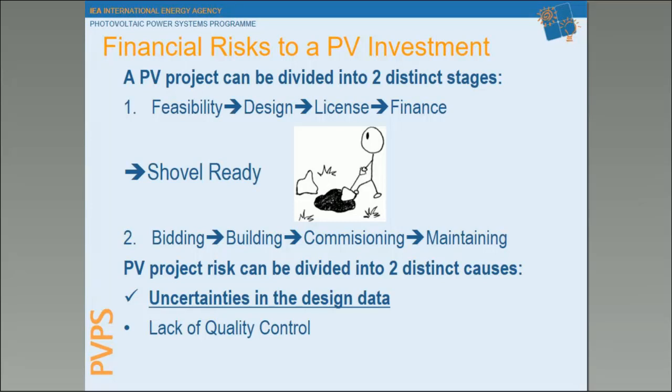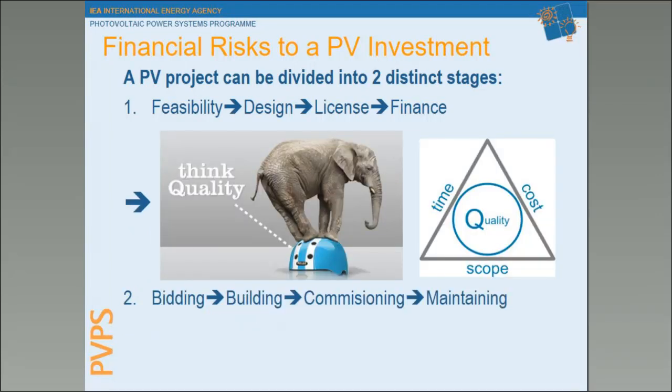If decisions are changed during the financing and bidding stages, then the owner must ensure that the necessary simulations are reworked. Achieving the financial goals of the project depends upon good quality control to ensure continuity. Quality control to ensure continuity is the next message that we want to get across. Quality control is loyal to ensuring that the level of quality designed for will carry through both distinct phases of the project. And while we're talking about quality control, let's have a word about quality itself.